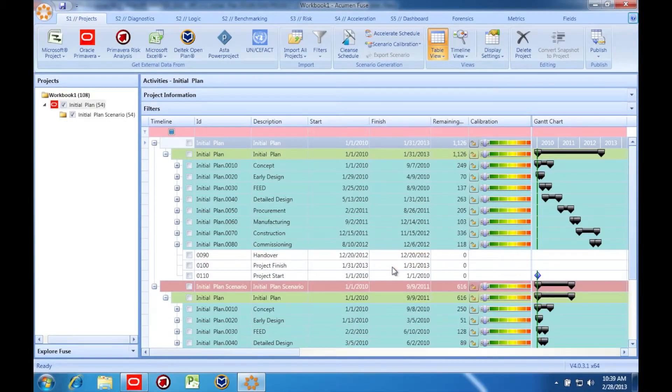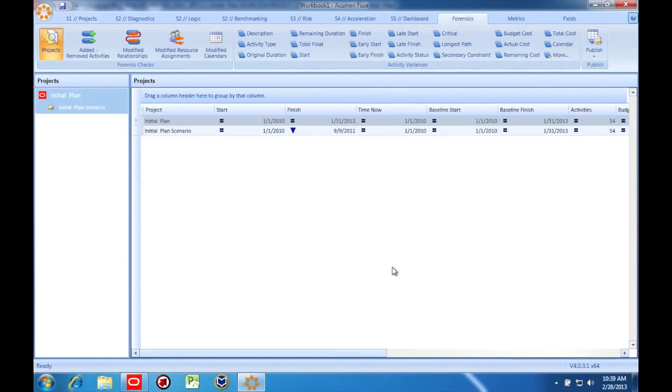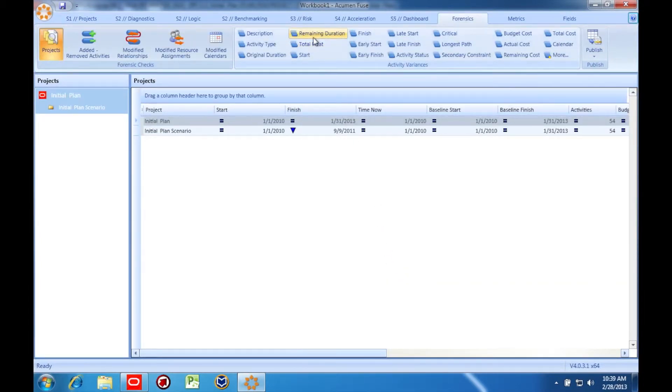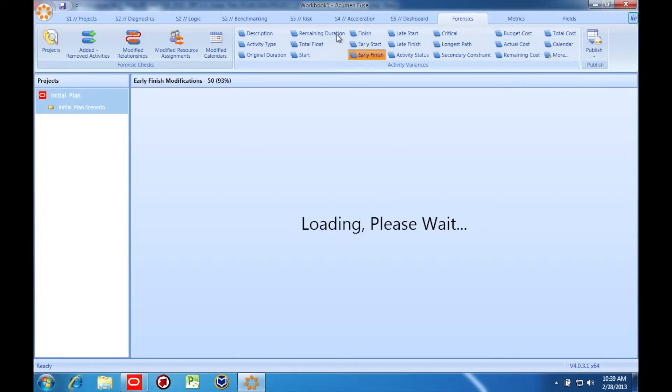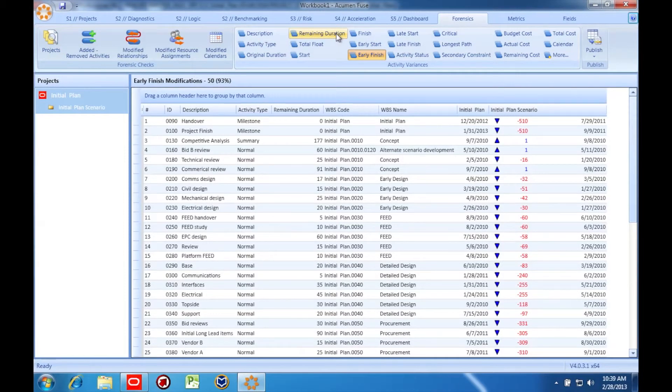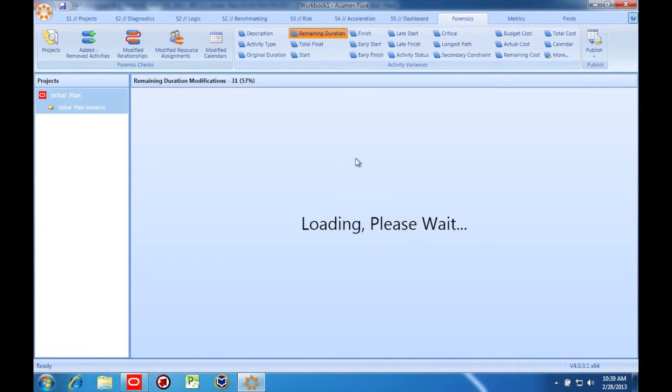Here in Forensics, I can select any field from the list or many more, and see how the values changed from the original schedule to the scenario we've created. Here are all the remaining duration changes, for example.